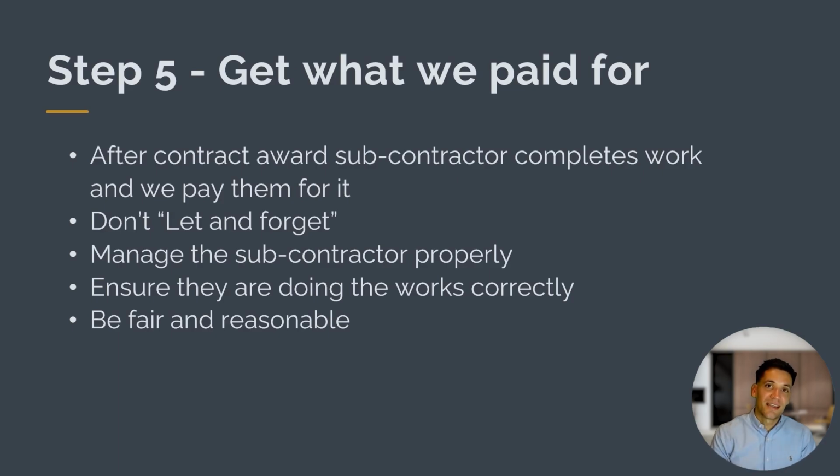Step 5 is then to get what we paid for. So after the contract's awarded, the subcontractor or supplier will deliver what they said they were going to do. They're going to do the work defined in the contract. The worst thing we can do is let and forget. Even though we've signed a contract, we still need to stay on top of our subcontractor and supplier. We need to coordinate and manage them properly to ensure they're doing the works correctly, and then pay them for the work they've done. Doing so, we want to be fair and reasonable, but also firm.